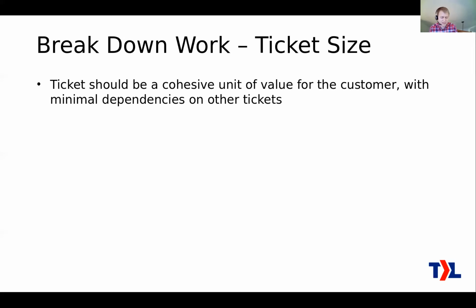I'll just kind of as an example. You're going to order it. Then you got to configure the router. Kind of thinking in terms of it, it comes to your office. You configure it, and that's one unit of work, and then you actually go out and you replace it at the customer site. Okay, so that's another unit of work. So that's probably like 3 tickets, just as an idea.